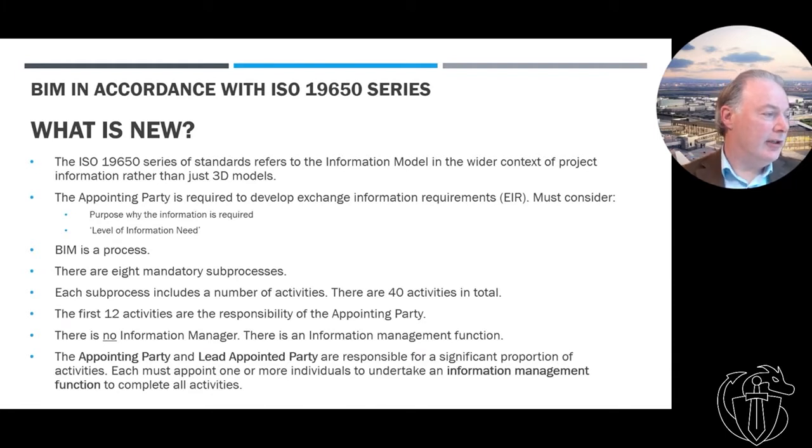Another important point in 19650 is there is no information manager role. The concept is there's an information management function. I think that's probably a good idea in the sense that it puts the responsibility on the appointing party or the client, and also on the lead appointed party, the actual company that you're appointing, to undertake all these tasks. They can have an information manager or a BIM manager or whatever to actually do that. All that matters is that they actually get done. So overall, the appointing party and the lead appointed party have significant responsibility in making sure that everything is done.